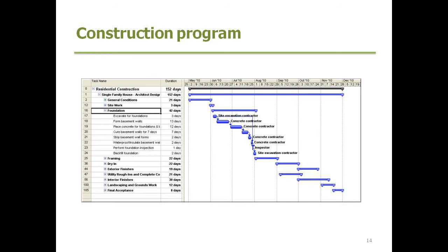Maintaining a current and up-to-date construction program. With the construction programs also, I generally like to keep the old programs filed as well, just to reference back again, although the current construction program should show where things have improved and where things have deteriorated.